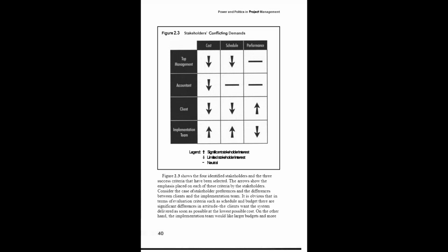When the client is happy with the number of specification changes the project manager is willing to make, the team is likely to be upset by the manager's unwillingness to freeze specifications. Likewise, when the team is satisfied with the amount of time the project manager has scheduled for the development process, the manager is likely to hear complaints from top management about a lagging schedule.